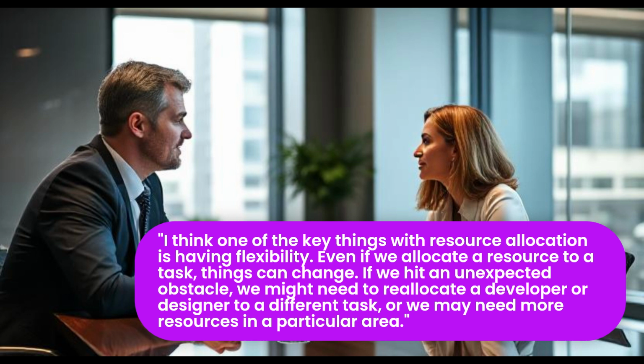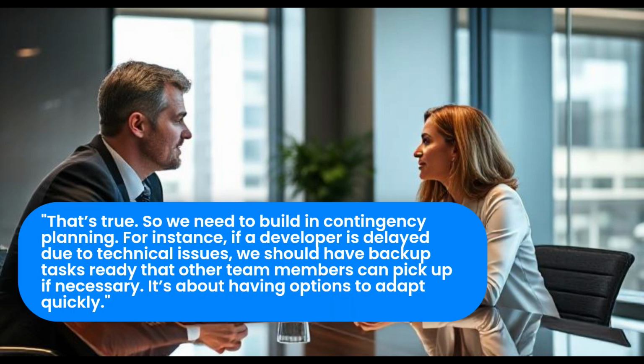I think one of the key things with resource allocation is having flexibility. Even if we allocate a resource to a task, things can change. If we hit an unexpected obstacle, we might need to reallocate a developer or designer to a different task, or we may need more resources in a particular area. That's true. So we need to build in contingency planning. For instance, if a developer is delayed due to technical issues, we should have backup tasks ready that other team members can pick up if necessary. It's about having options to adapt quickly.